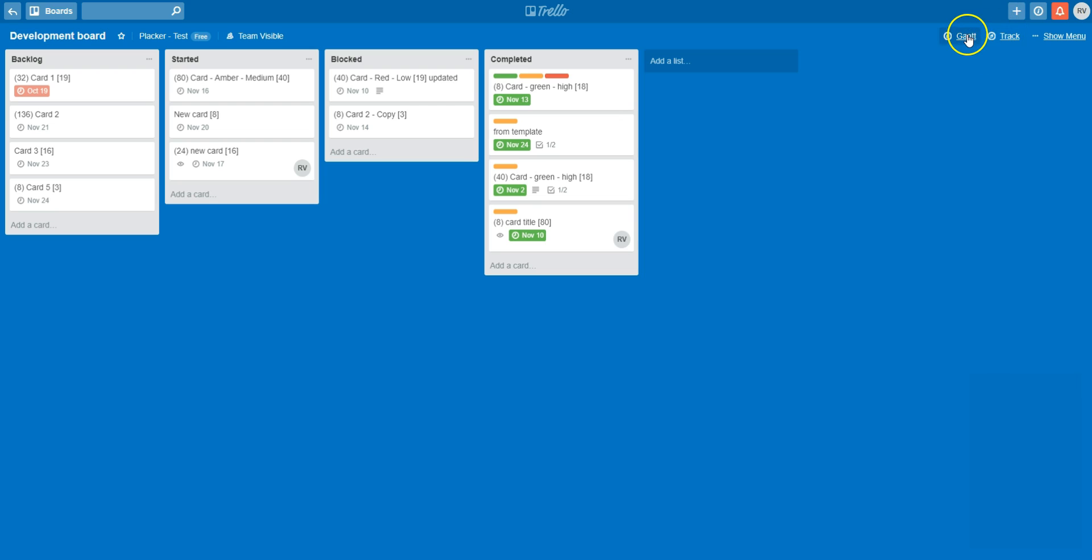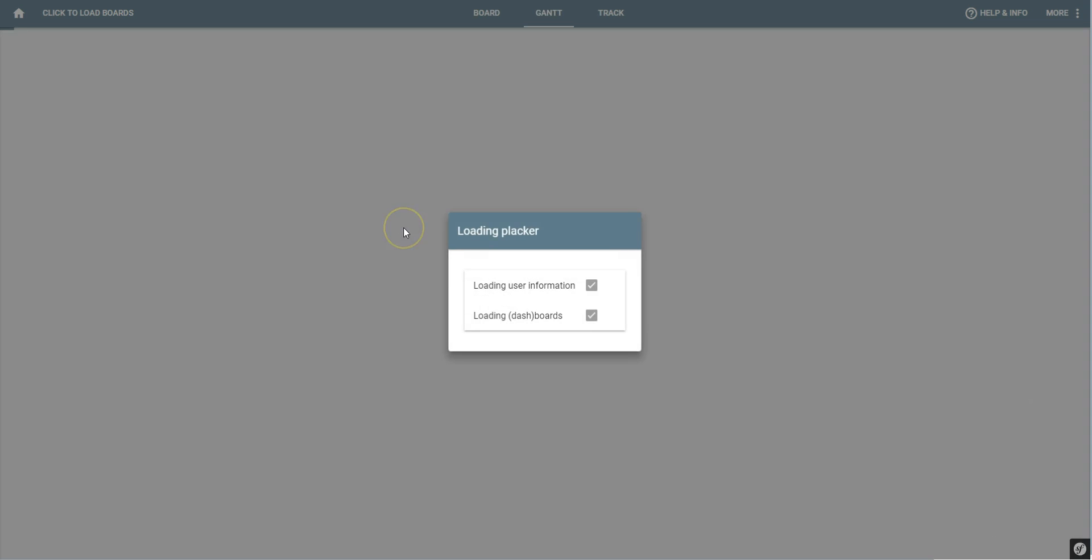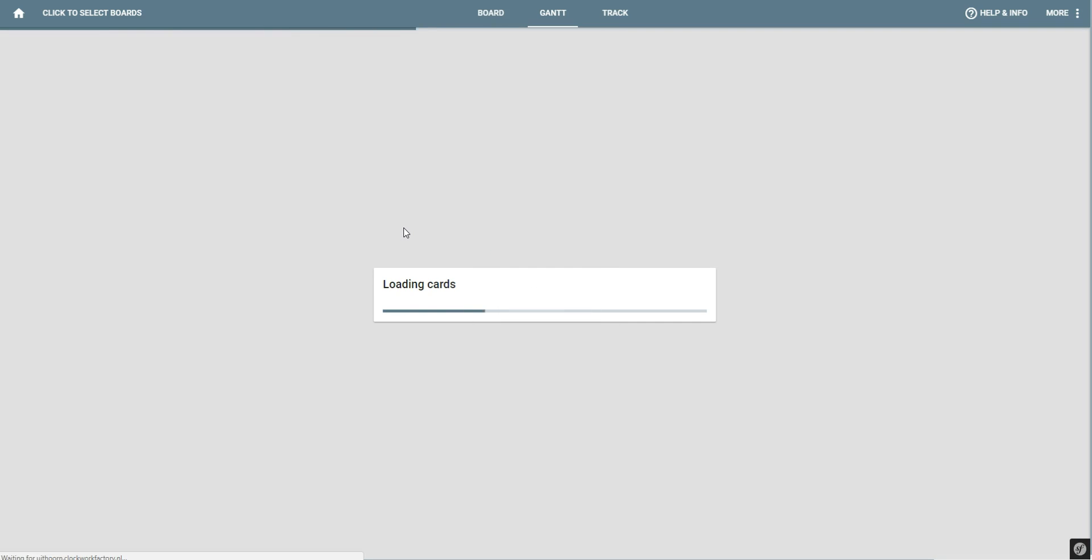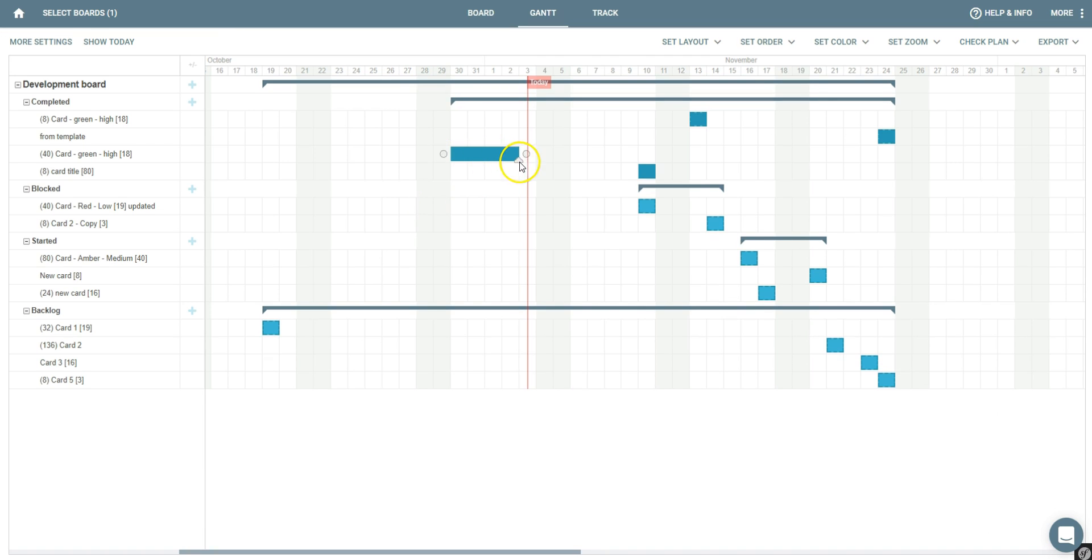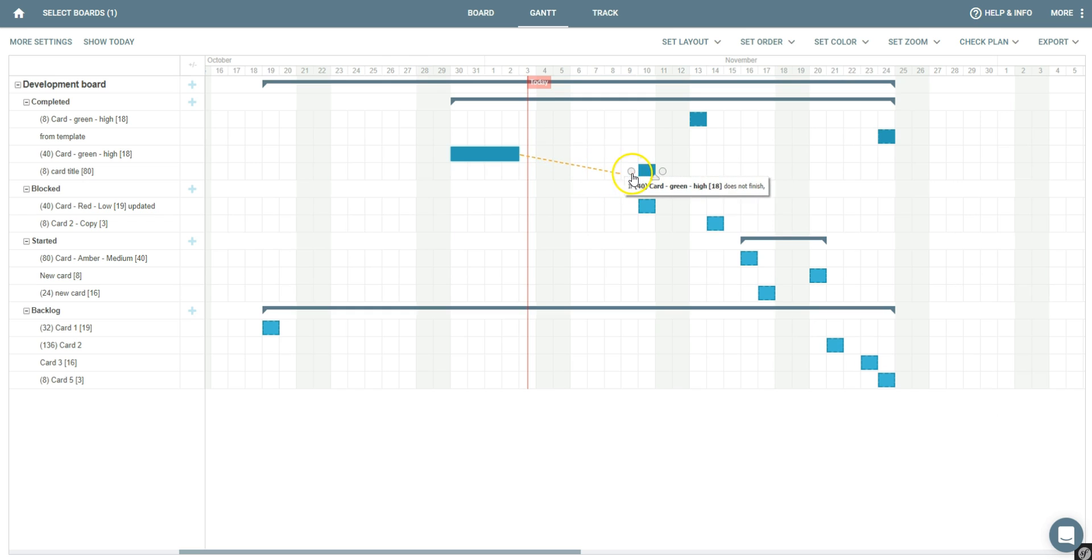When I go to the Gantt chart, I can visually plan the cards of my board. I can drag to add a start and an end date, and I can create dependencies to indicate that one card should start before the other is finished.